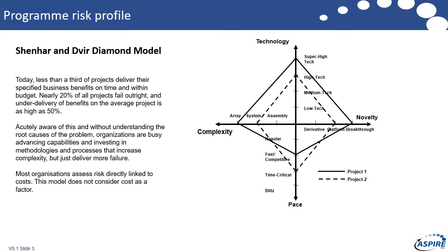As you can see, the four corners are novelty, have you done it before? Pace, is it breakneck, are you doing it really quick? Complexity, how complex is the underpinning technology and the resilience of the stuff that you're changing? And the newness of the technology itself and how much experience have you got with it.